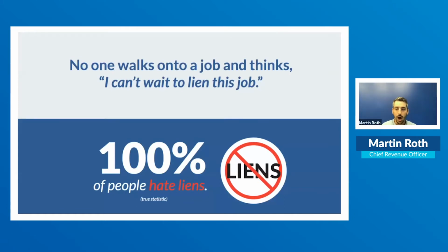This is a scientific fact. 100% of people do not like liens. Nobody walks onto the job and says, I can't wait to lien this job. Everybody starts the job out with the best of intentions, wanting good partners, wanting repeat business. Nobody wants a lien. So if nobody wants a lien, but you have this device, this lien right, this instrument that you can use to make sure that you get paid on time and get paid fairly, and that the owner is definitely conscious of because they're requesting lien waivers, it's really important that you understand how to use lien rights and that you use them when they are appropriate. Not on every single project, because you may decide for relationship reasons that you don't want to protect lien rights, but at least you can make a conscious decision about it as opposed to just ignoring it and hoping that you get paid, right?